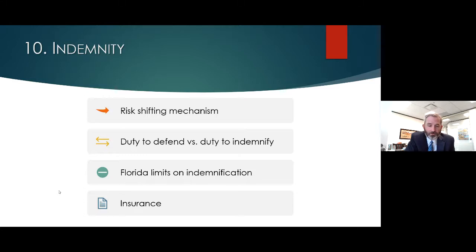Recommendation: try to always get rid of the duty to defend if you can, and not have both that and the duty to indemnify. We'll talk briefly about Florida limits on indemnification. Florida, like many states, has an anti-indemnification statute. Florida's is construction specific. Other states may be broader, but there are often statutory limits on what parties can do in their indemnification clauses in their contracts.